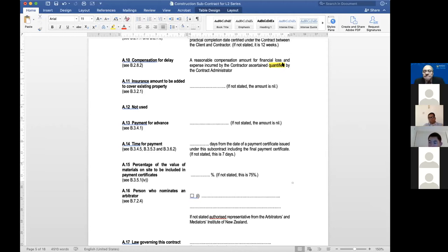Okay. Right. There's one more question from Ms. Chia. Is putting the phrase like compensation for delay better than liquidated damage? I've just explained. I'm not sure when this question was asked. The answer is, personally, if you put a liquidated damage, you can, but what amount are you going to put for that subcontractor? 1 million? Or are you going to put $1,000? Meanwhile, as a main contractor, you're compensating the client $1 million per day. Are you okay with that? You can. We can do that. Fine.